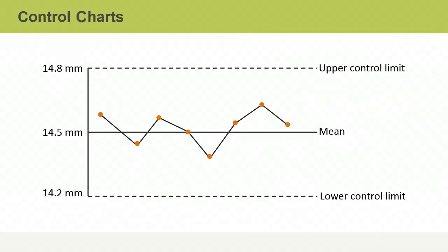Control charts are used to monitor performance of a process over time and against established control limits. Although a control chart is most often used to track repetitive manufacturing activities, it's a versatile tool that can also be used to monitor management indicators, such as costs, schedule, volume, and frequency of scope changes.